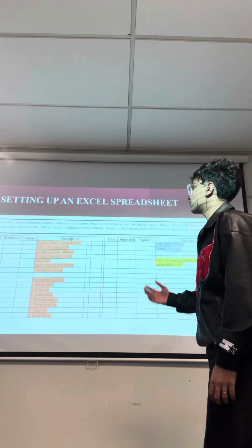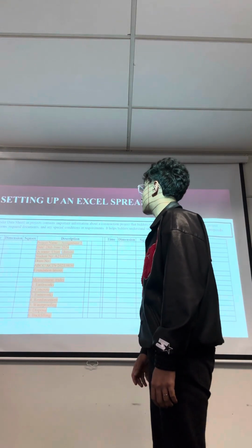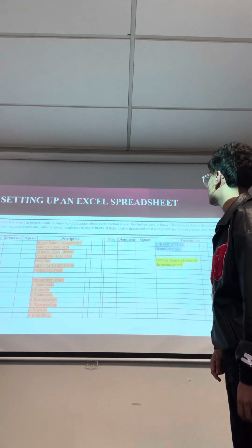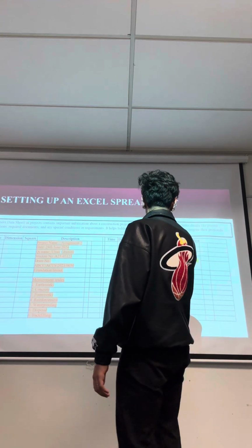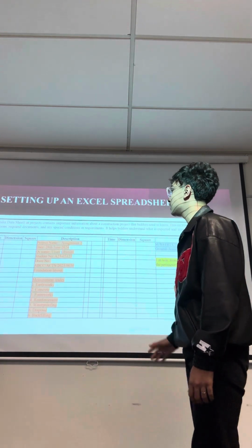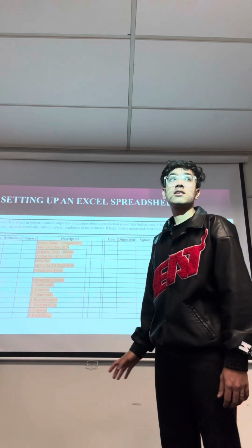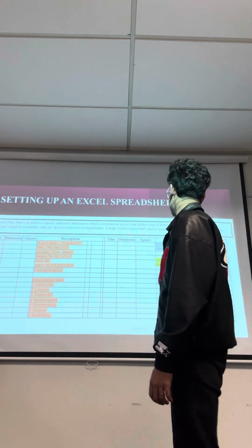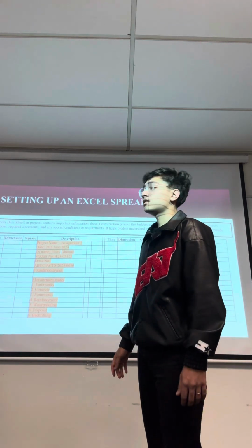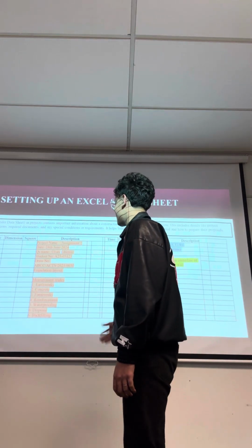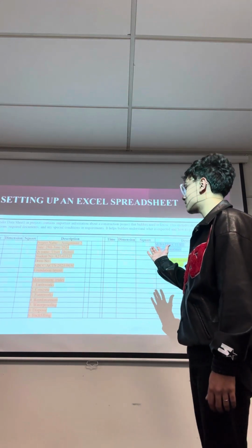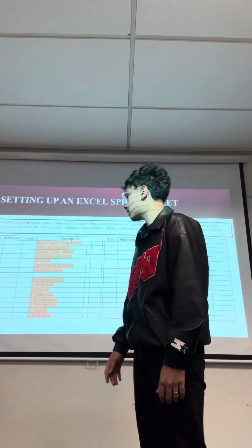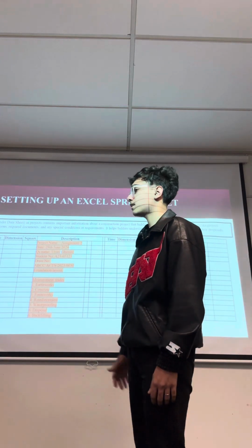So the first one is the standard data sheet. It contains important information about the construction project that bidders need to know. This includes details like project specification, required documents, and any special documents or requirements. It also helps bidders understand what is expected and how to prepare their proposal. So here are the following descriptions. The measurement trades are earthworks, concrete, formwork, reinforcement, waterproofing, disposal, and backfilling.